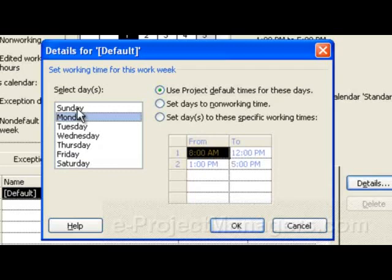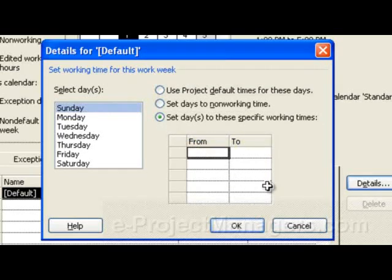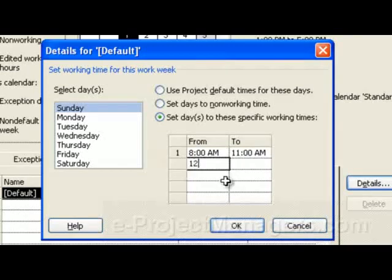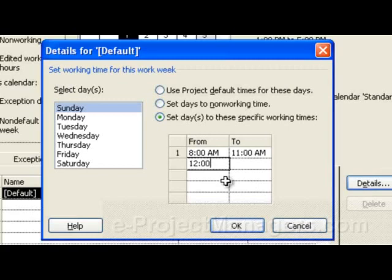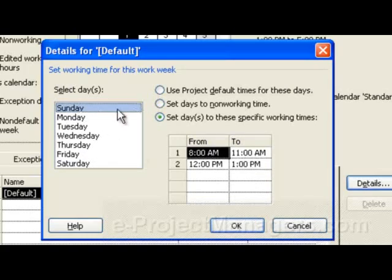So if you want to change any of the days to working days or non-working days, you can do that from here. For example, I could set Sunday to be 8 a.m. to 11 a.m. — we'll give them a lunch break — and then 12 p.m. till 5 p.m. So I have Sunday set to those hours.